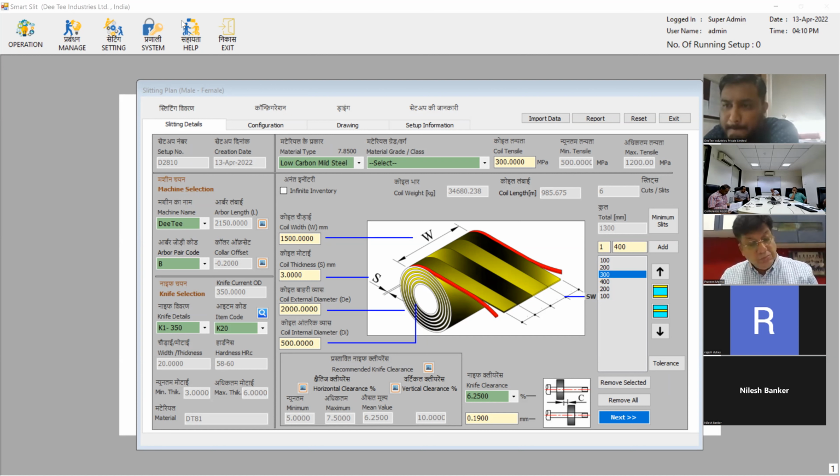Suppose this rubber spacer has life limitations, then we can defer those deliveries if they are not needed immediately and cannot be consumed within a year or 2 or 3, and would just be kept idle and degenerate by themselves. If this is our observation, we can recommend the customer accordingly.